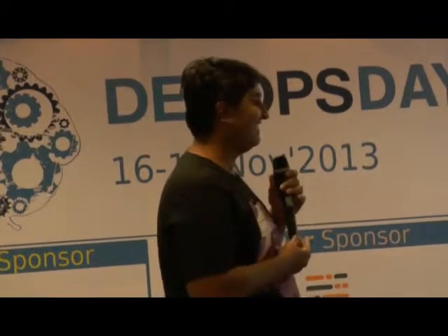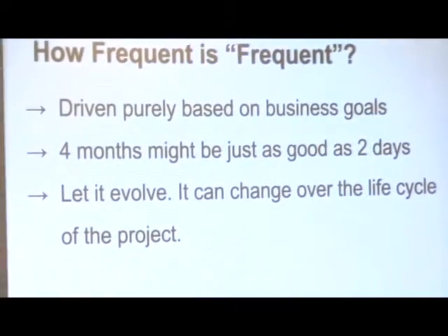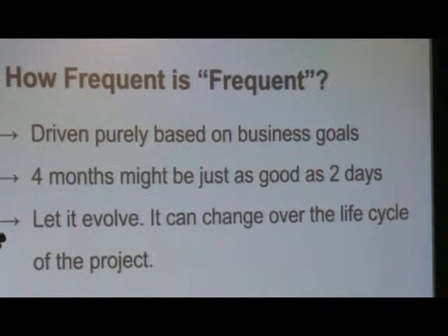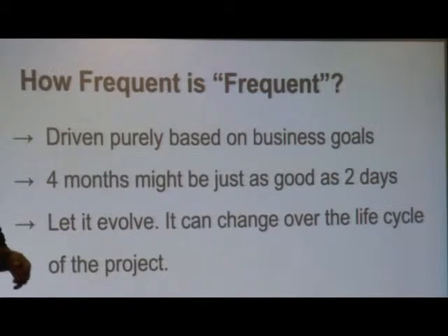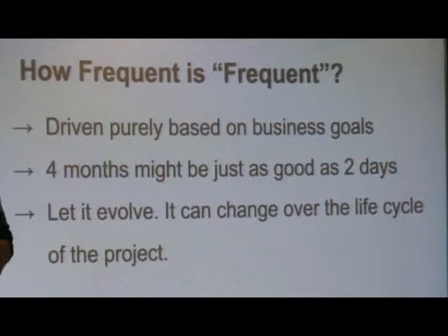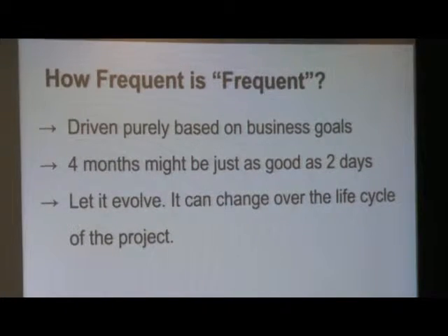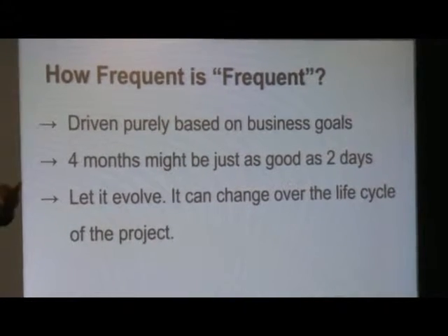Yeah, and the point here again, let it evolve. We're saying it doesn't have to be one thing that you keep going on, right? At the beginning of the project, you might start. In fact, that's exactly sort of what happened with us in a project. We went into production, we just arbitrarily decided let's do one push to production every week because we can do it, and then soon it started becoming a little cumbersome to keep on with it for whatever reason, right? There's probably not enough done in the automation or whatever it was, right? And then slowly we moved to bi-weekly, and then we had a conversation with the customer.